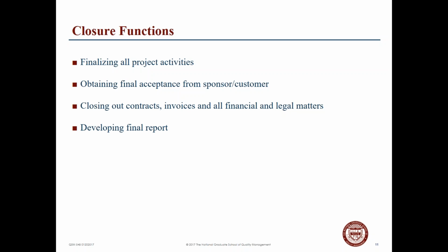Ultimately, obtaining final acceptance from the chain of command, our project sponsor, our customers, finalizing and closing out contracts, invoices, and resolving any financial and legal matters that may have developed during the previous stages of the project. And ultimately developing a final report and a report of execution.